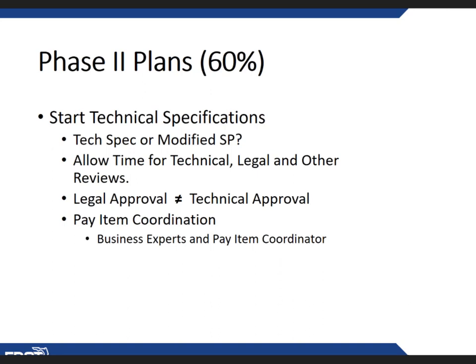If you're trying to match existing conditions, in some cases that's fully justifiable and a reason why we can sole source something, but there's a process that has to be followed there. So, like I say, opening the pay item is the least of the worries. It's, have you followed through? Did you get approvals for brand name products? Did you get approvals to do something non-standard?